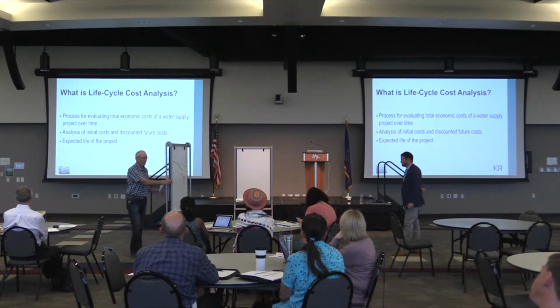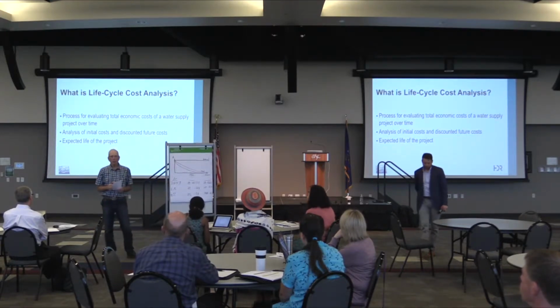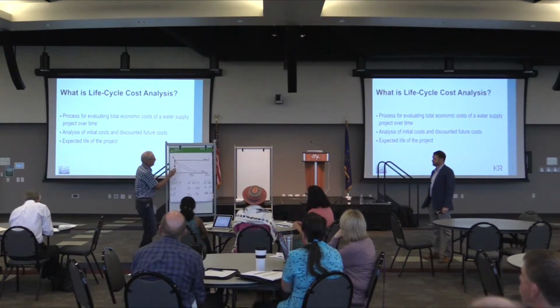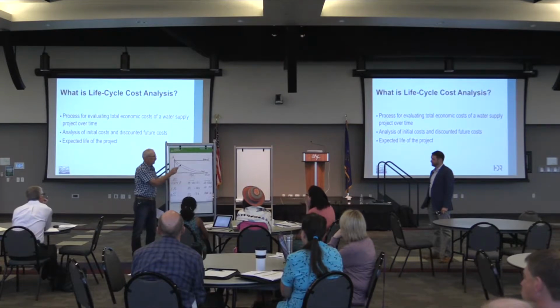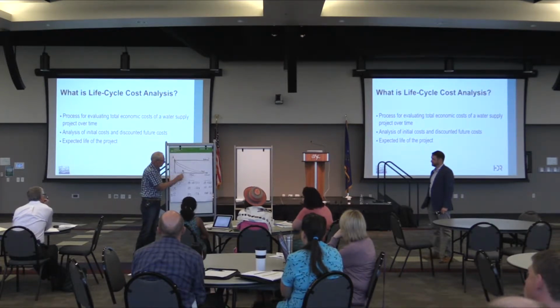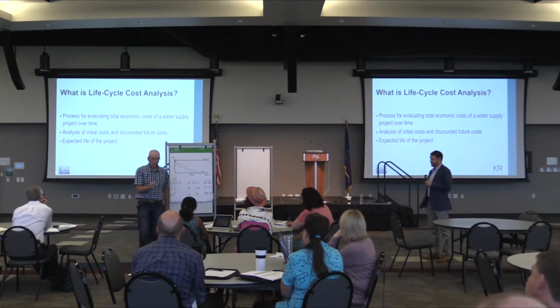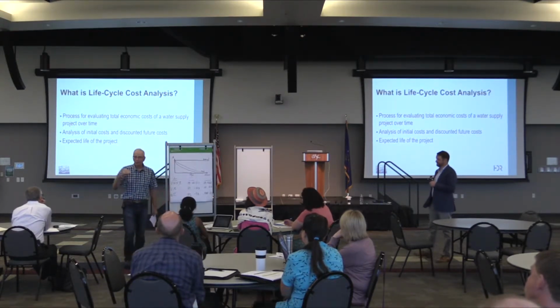Okay. That gets us to an interesting side here. We use a discount rate to discount future values to the present. Now, if this is the stream of costs, nominal dollars, in other words, today it costs $100, and in 25 years it's going to cost $100, and in 50 years it's going to cost $100. $100 50 years from now isn't the same as $100 today, is it? Good, because if you said it was, I'd have you give me $100 today, and I'd give it back in 50 years. That's why we discount $100.